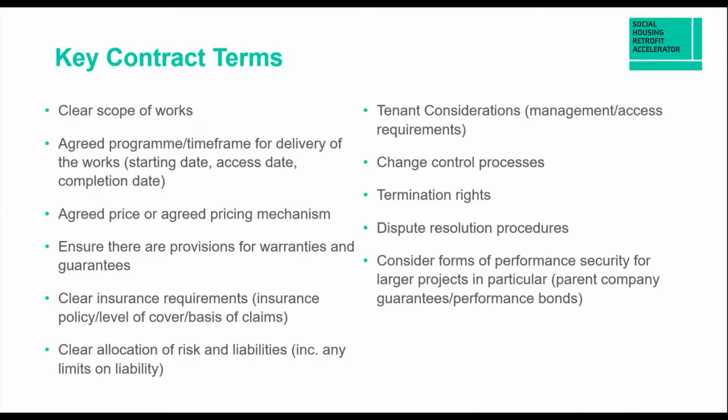The next one, agreed price or an agreed pricing mechanism. So how is he being paid? Is he being paid in accordance with a lump sum? What's included in that fixed price or that lump sum if it is? And that will really link back to having that clear scope, so there's no arguments later down the line as to what is or is not included in that lump sum.